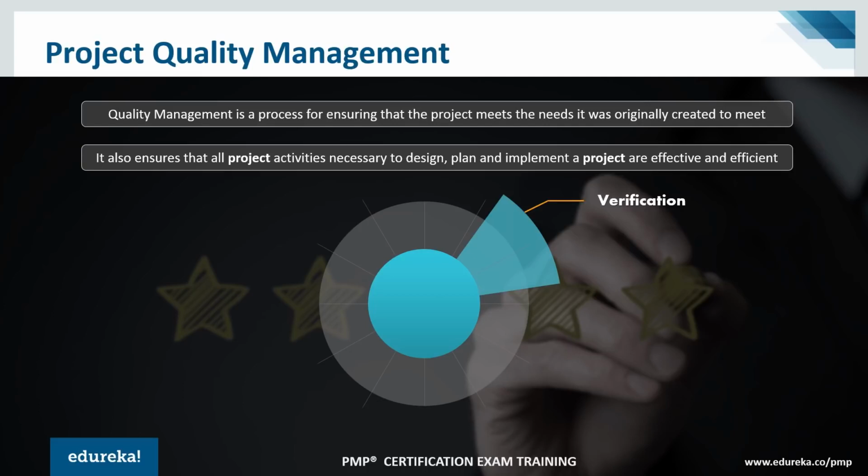The continuous verification is what is expected by the team and the project manager. For example, a simple verification could be a traceability matrix. We ensure to have a traceability matrix on the project so that we verify the requirements that we have gathered from the customers. Are we incorporating those while doing designing, coding, testing, deploying, etc.? So that simple verification really helps us. And it's not just backwards traceability, but also forwards traceability that we ensure we are doing. So that's a quick example of verification.